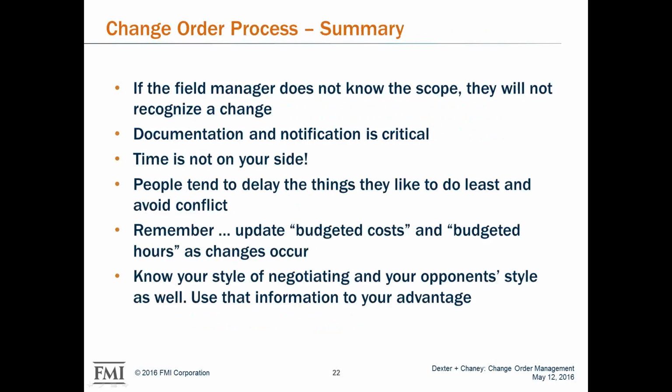So in terms of process, you need to think about your field managers, project managers, superintendents. Do they know the scope? If they don't, they're not going to recognize the change. Documentation is critical. Time's not on your side. The longer these things drag on, the likelihood of you getting all of your money goes down exponentially.